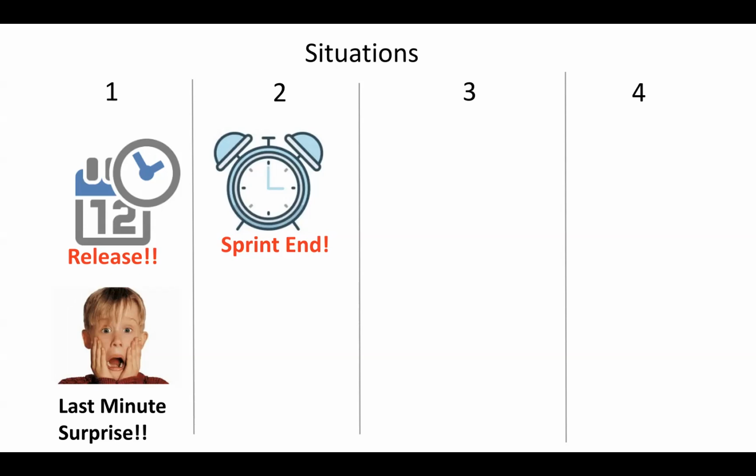And the product owner can decide whether you should take that up in the next sprint or not. Now, in this option, there is a conscious decision that has been made between the product owner and the team on what they should do. And it is completely up to their discretion what they would want to do. But keep in mind, the important thing to note is that you're not opening a bug. There is a conscious decision that is made by this smart collective group to carve out a separate story, or to punt it.